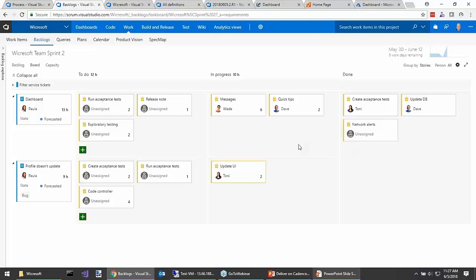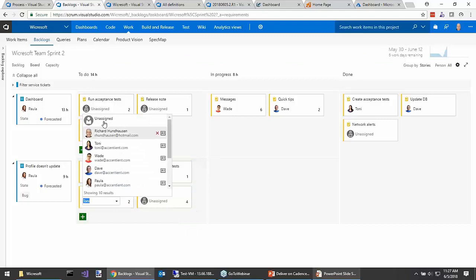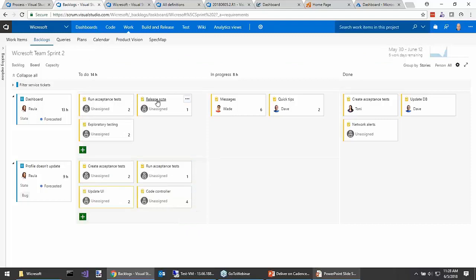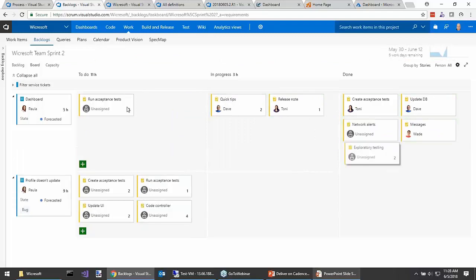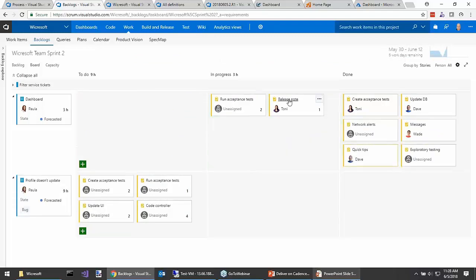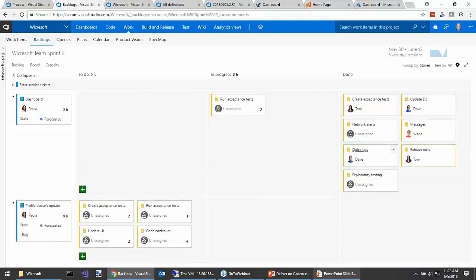Because in the last couple days of the sprint, what's left is the most important, hardest things, the integration, the testing, and it's hard to pull these things together. So we want not to work that way. We want to, as much as possible, even though Tony hates writing documentation, hey, we want you to be professional here and help us with the release notes, so as we get these other things done, we can get all these items moved from the left to the right and really reduce the risk in that.